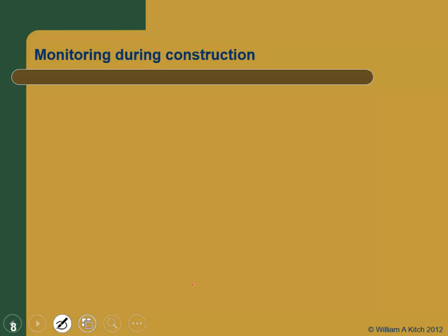So, monitoring that we need to do during installation. Excavation support is probably one of the places where monitoring is the most important, because our entire design was based on a specific construction sequence, right? We assumed the construction sequence to determine the loads and the struts. And if that's not the construction sequence that's being followed, you're going to have problems. And there's going to be lots of incentive for the contractor to not follow the procedures that you specified.